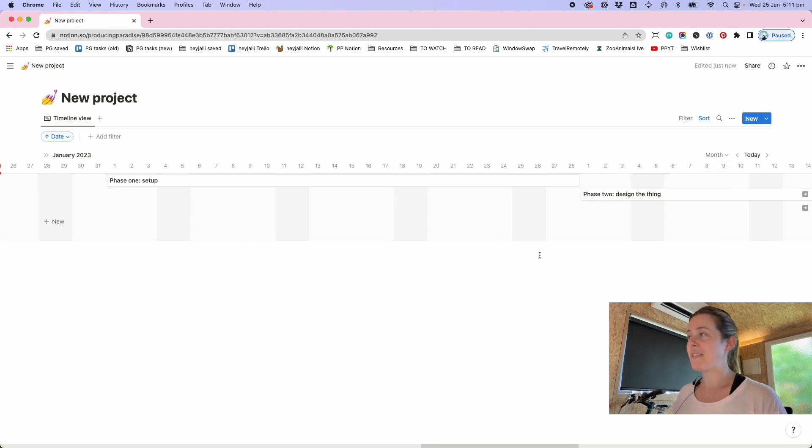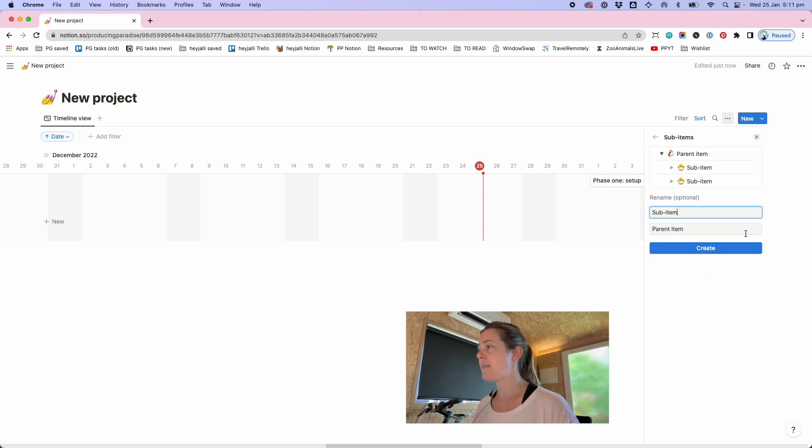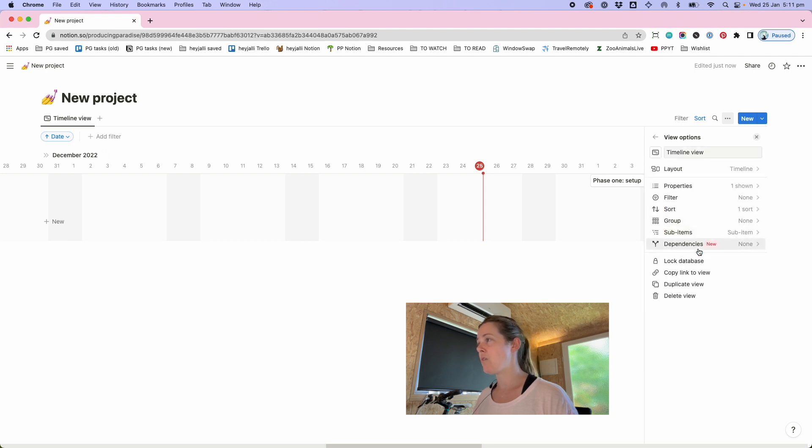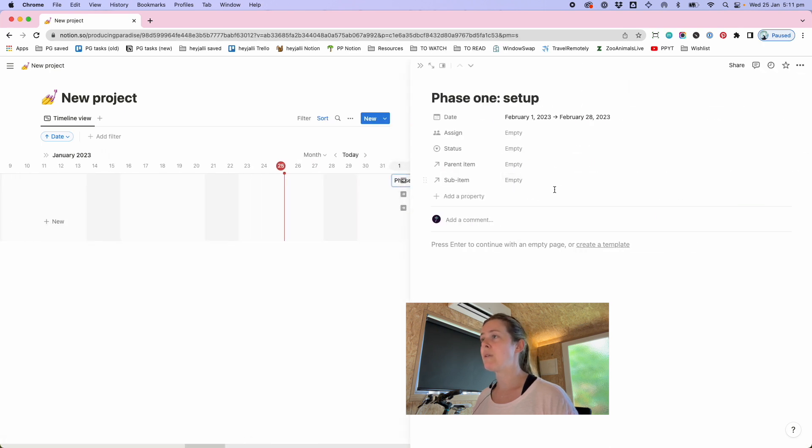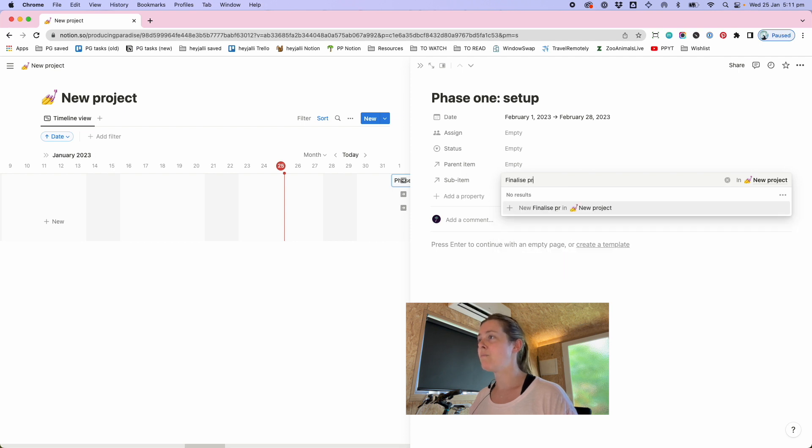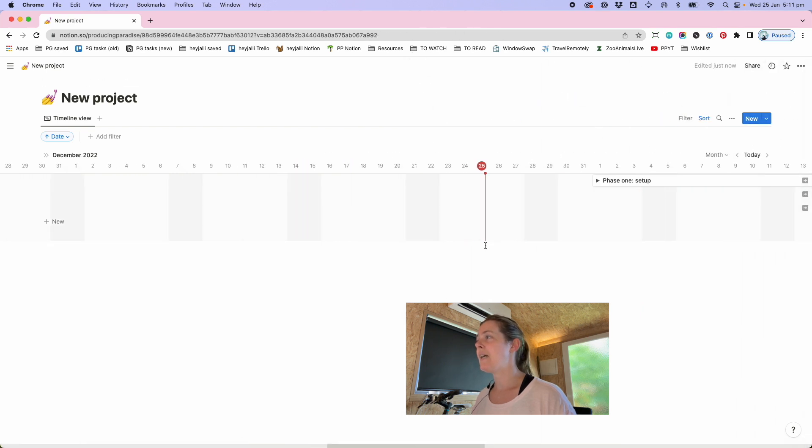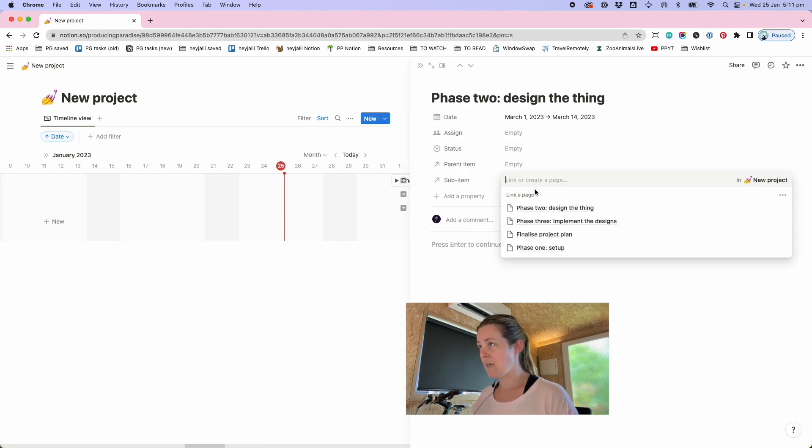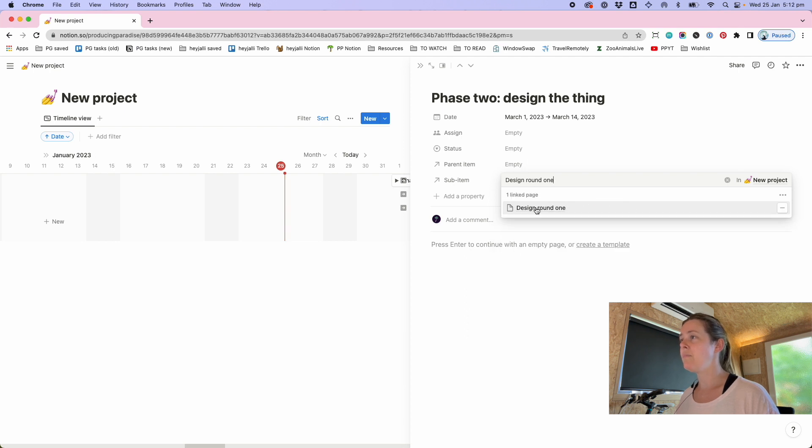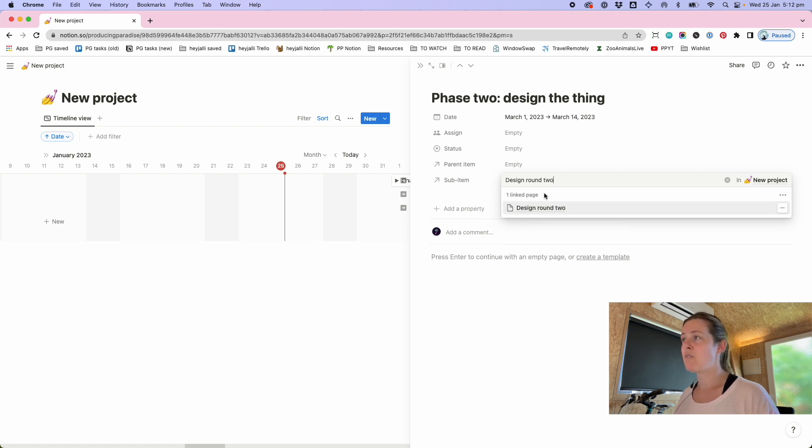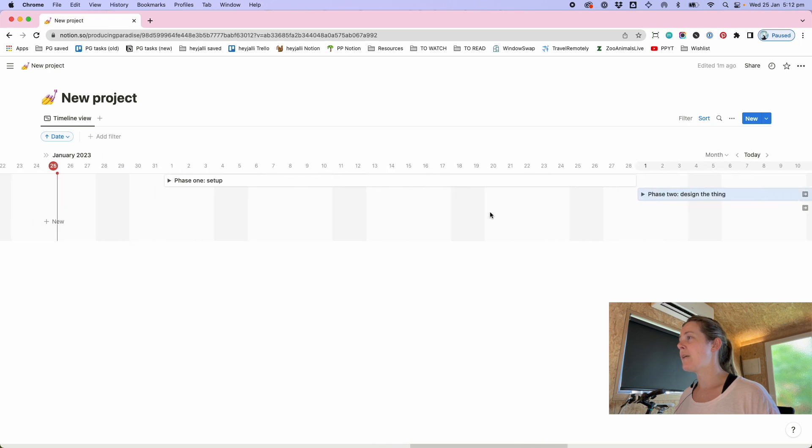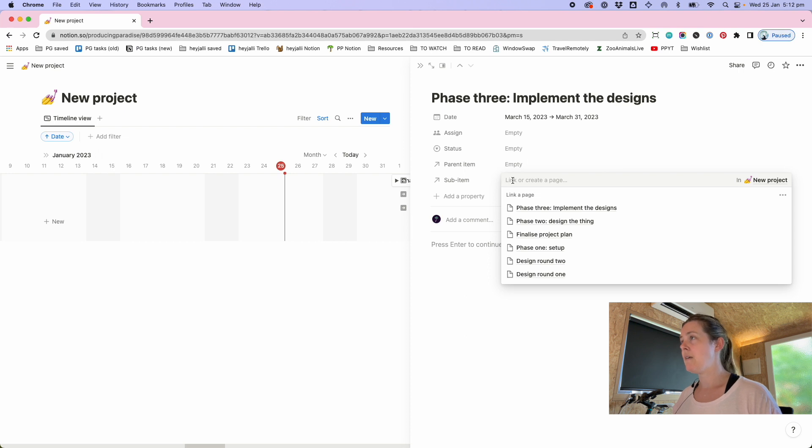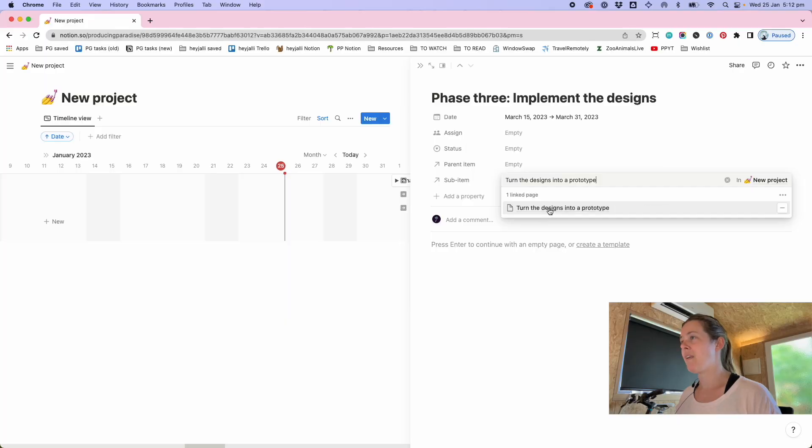Once you have all of these building blocks in place to add the sub items you click those three dots at the top and try sub items sub item parent item that makes sense to me I don't need to rename those and once you've turned that on I can now go into phase one setup and say alright sub item finalize project plan for example and then say in phase two design the thing maybe one of the sub items here is design round one and maybe another one is design round two.